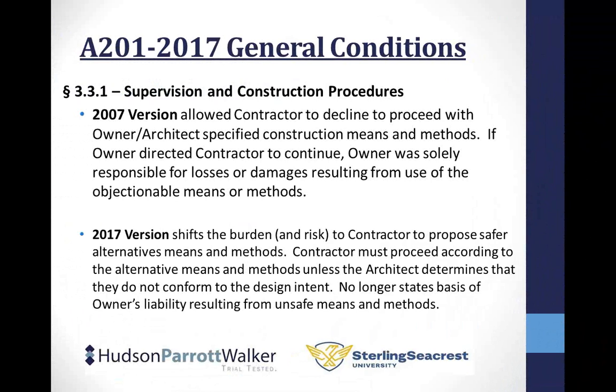I want to make sure everybody's clear on that. Number one, you have an obligation to look at those plans and specifications, and your subs must do the same, and they must tell you what they look at that seems to be a problem before you go into contract. I know it seems obvious, but we all know that subs don't necessarily do that. They sometimes show up raising their hand afterwards going, geez, I didn't realize this was going to happen until I got out in the field. That could be a problem. The means and methods is simply an extension of that.